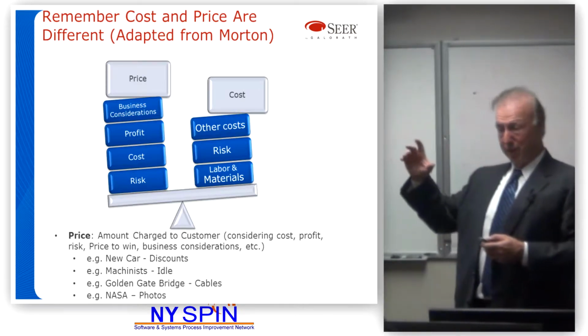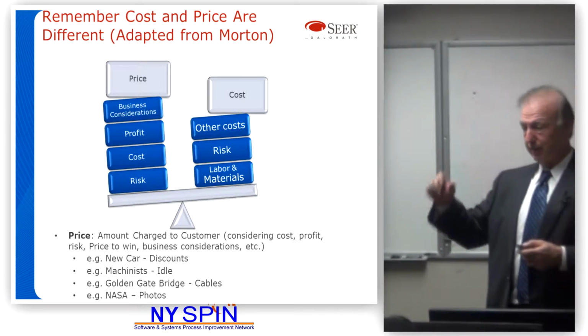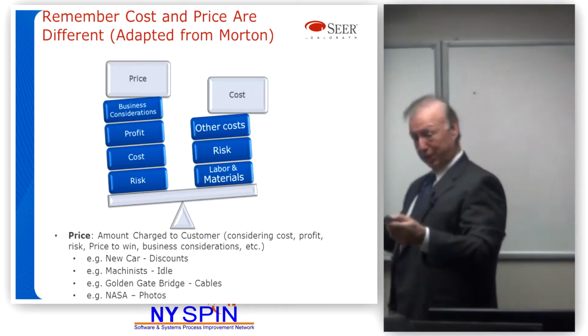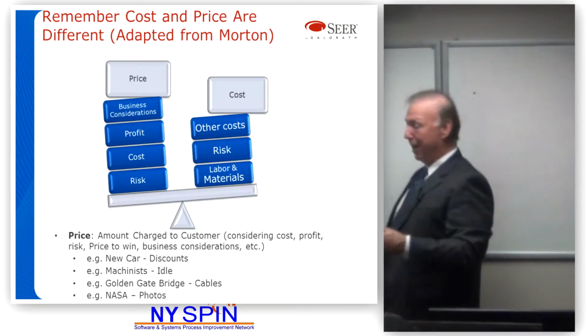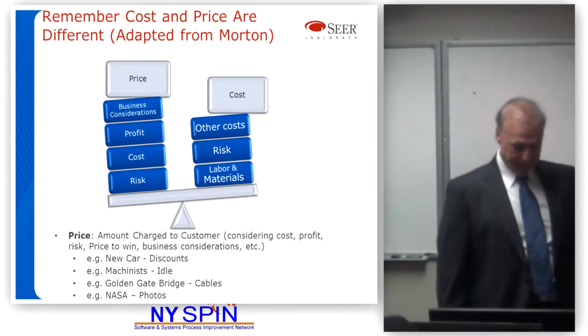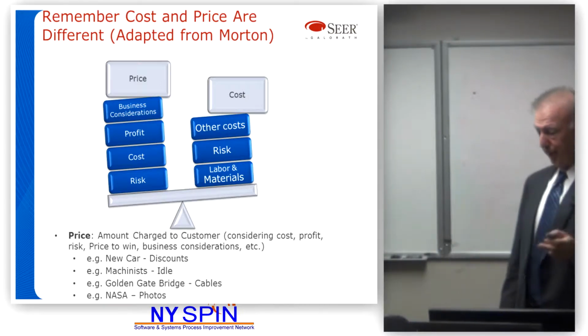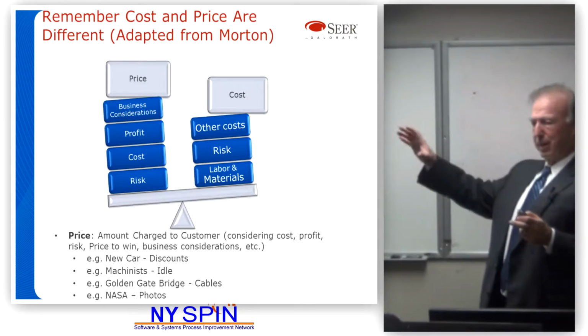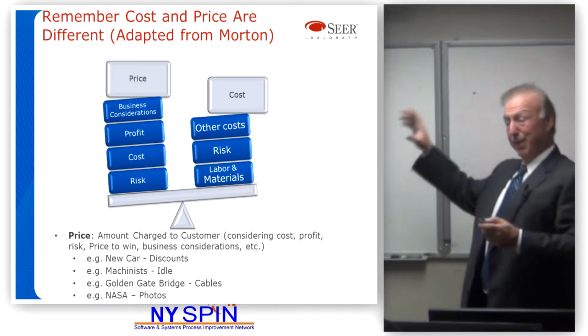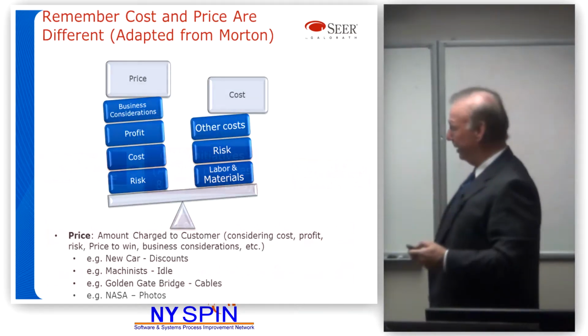It's important when you're estimating to understand whether you're estimating the cost or the price. If you're estimating cost, does it include profit if you're selling it outside? If you're estimating the cost internally, does it include all your overheads and things? Very important. And your answer can be your answer. Whatever you want to do is fine, as long as you write it down, do it consistently, and tell other people what it is.